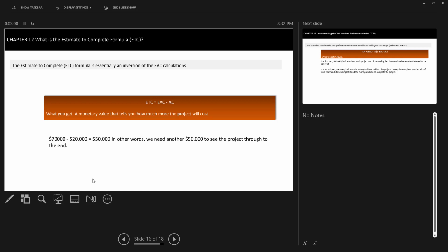Okay? Definitely this mostly will be different than what you have planned if your current performance is not one. If your cost performance index or schedule performance index is one, that means you're on track. Most probably, if you are expecting what's the estimate to completion, it should match, for example, what you have planned, because now you are one. Is it clear? Cool.